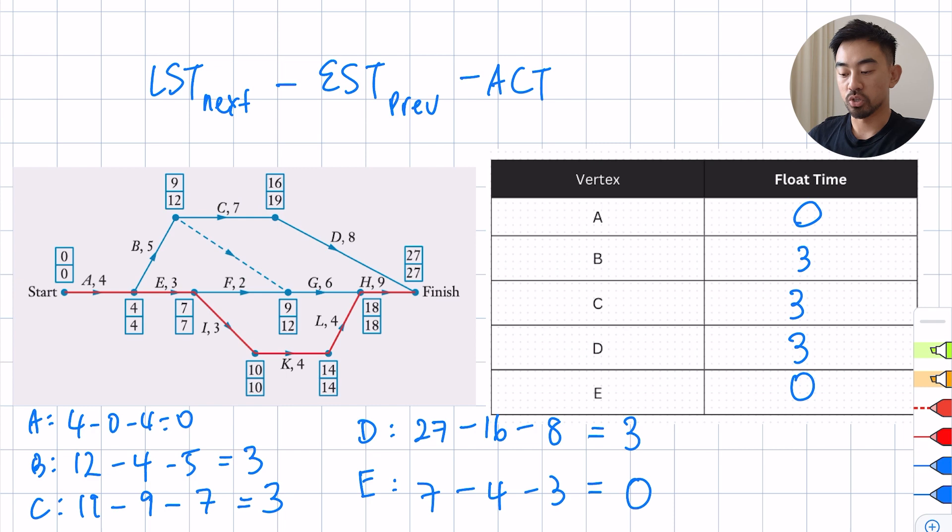So pretty straightforward. Just remember this formula: latest of next minus earliest of previous minus the activity and you'll always get the correct answer. All right, short video today. Hope you enjoyed it. I'll see you in the next one. Peace.